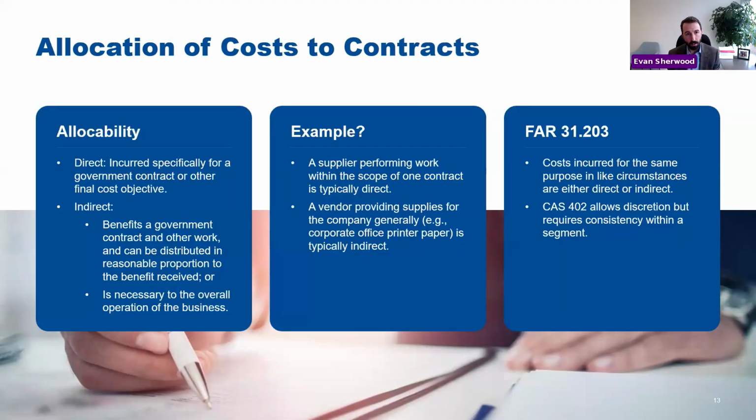Because again, as Morgan was saying, when you get a termination notice under FAR 52.249 and its variants for non-commercial agreements, your agreement is essentially converted into a cost reimbursement agreement in which you need to submit a cost-based termination settlement proposal. So all of these cost concepts become critical. And these are areas where it's very easy to make a mistake, especially if you were working on a fixed price contract to begin with.